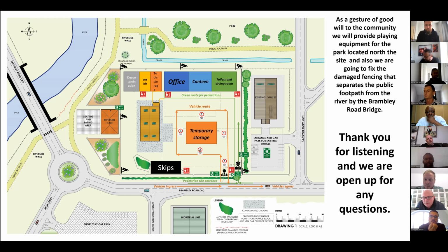Well, the intention is on one of the slides there. We have identified it and we've buried it around as well, and notified the authorities. So we're not going to get involved with touching that at the moment. Okay, but as you might know, that does spread quite a lot with the spores. So are you going to have any sort of monitoring regime? Yeah, there will be regular monitoring on a weekly basis, and for the barriers we'll have a checklist for the supervisor to make sure that they're in place and no one goes near it at all.